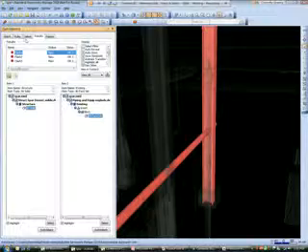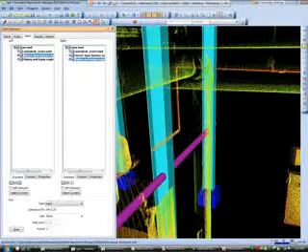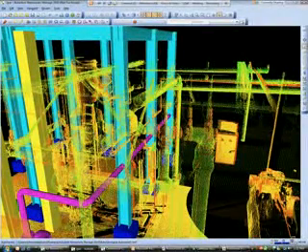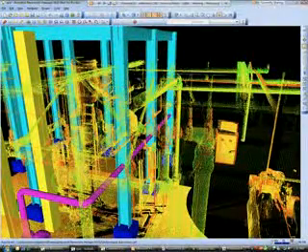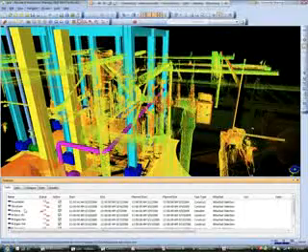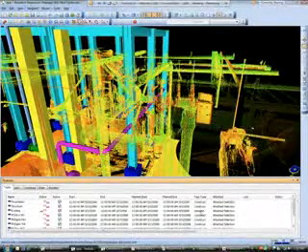And in actuality, what's happening here is that this particular model, let me minimize the clash here. This magenta pipe is an existing condition that is actually going to be demolished, and the cyan steel uprights in the background are going to replace that. So if I run the clash test on this, once again, we've linked in our clash, we've configured this for, is it a construction or a demolition?